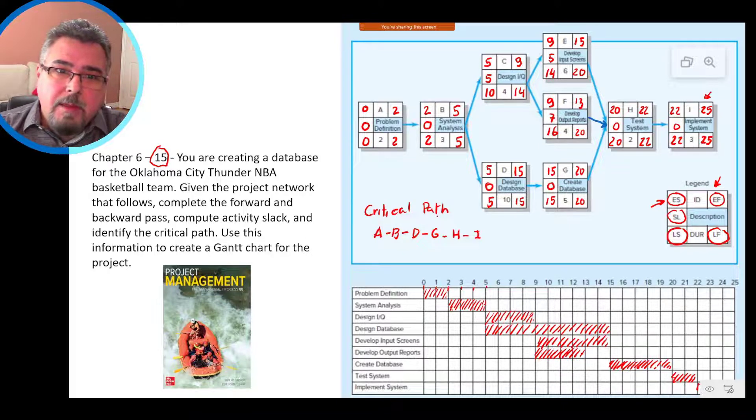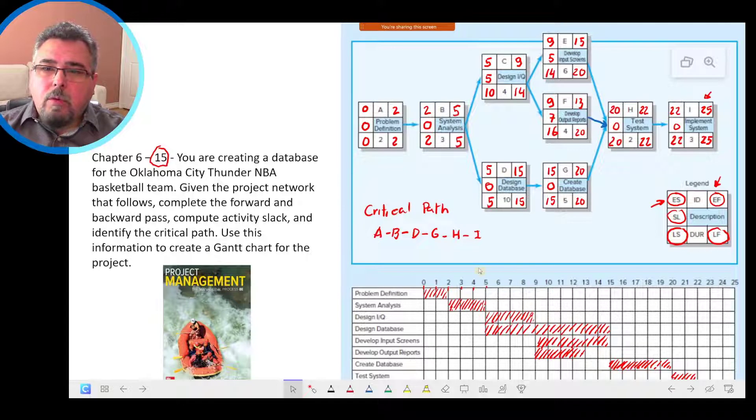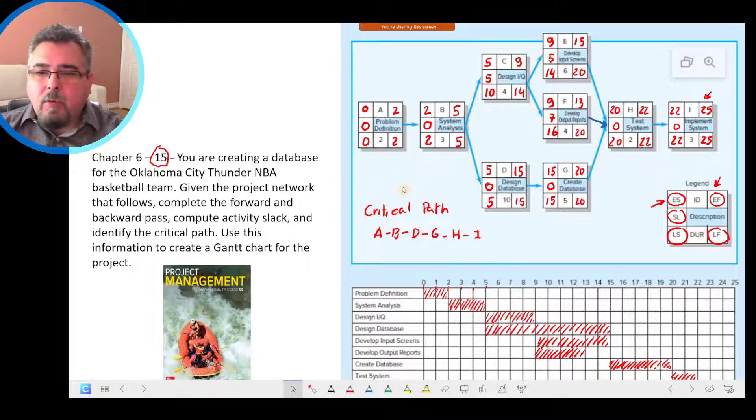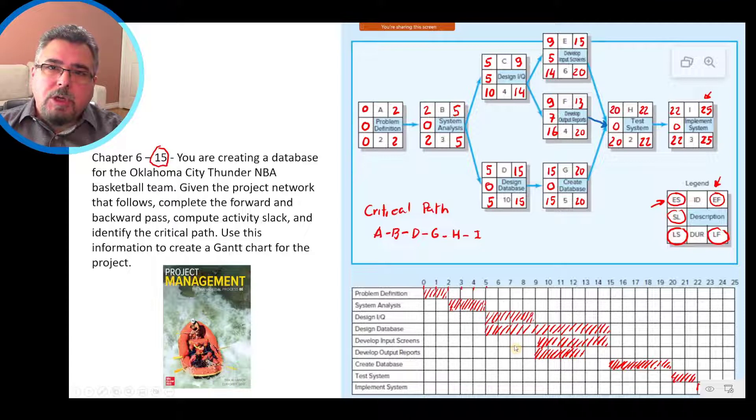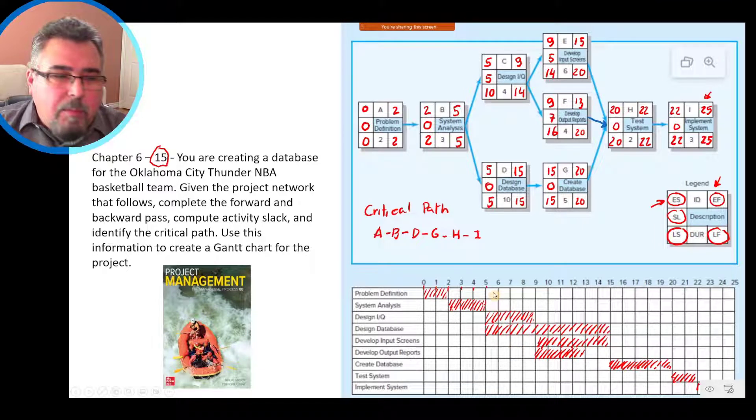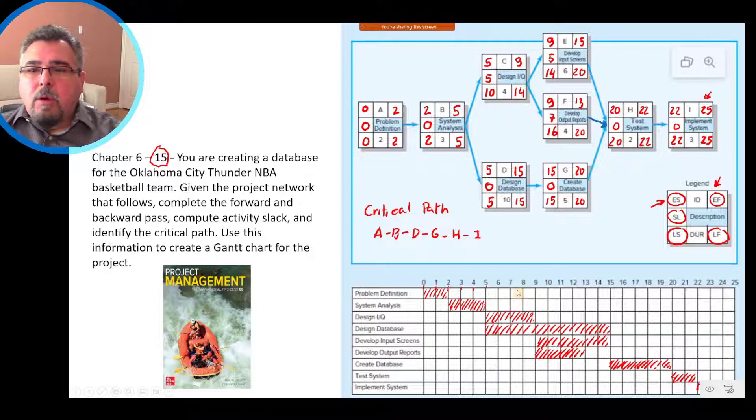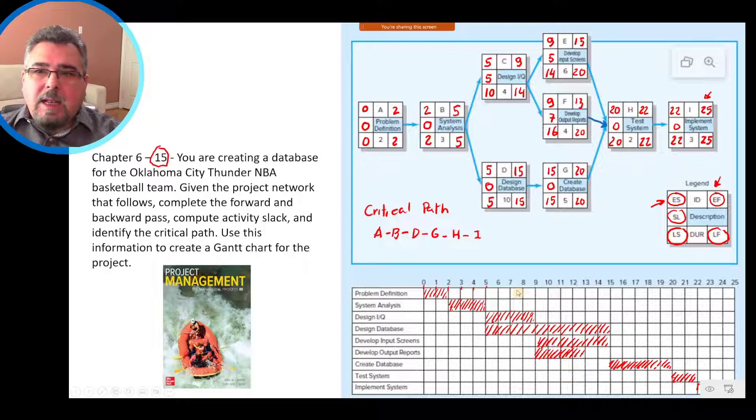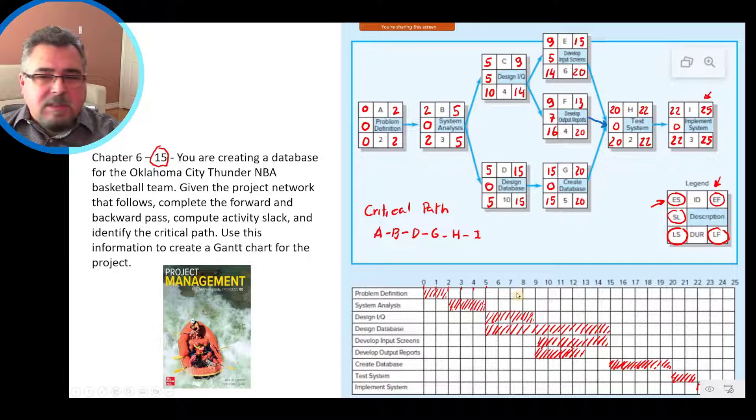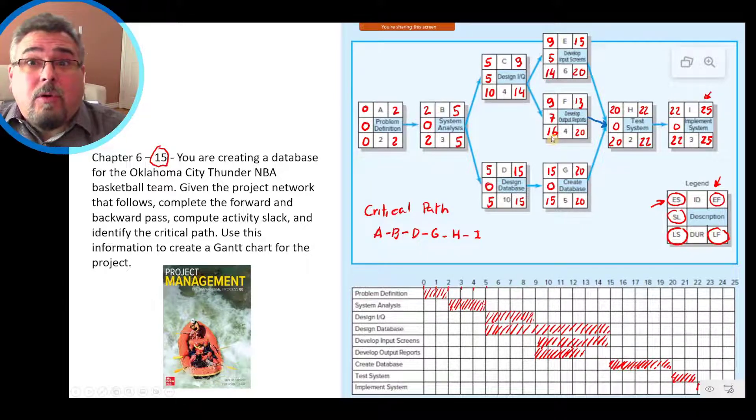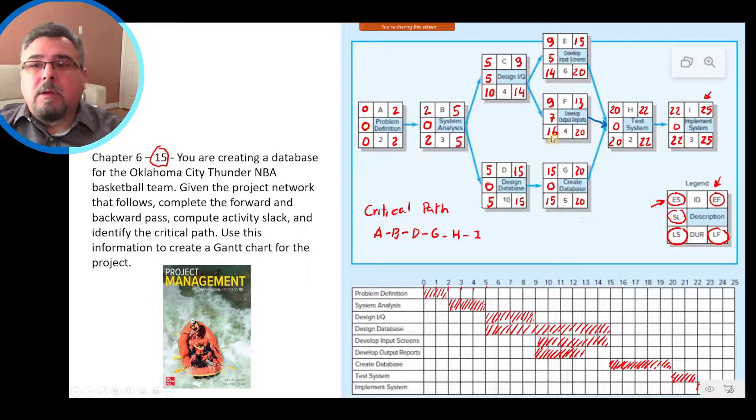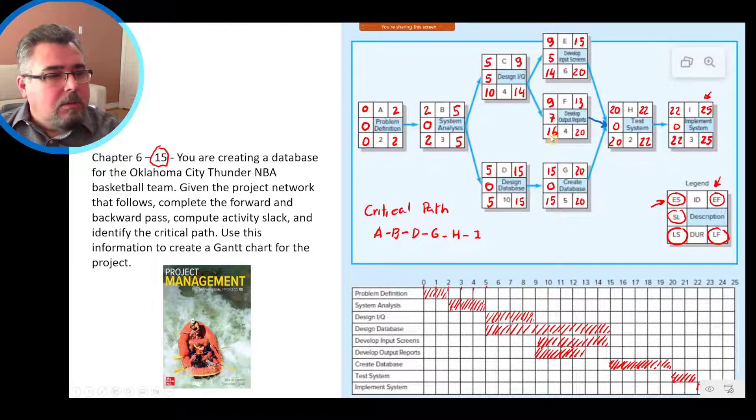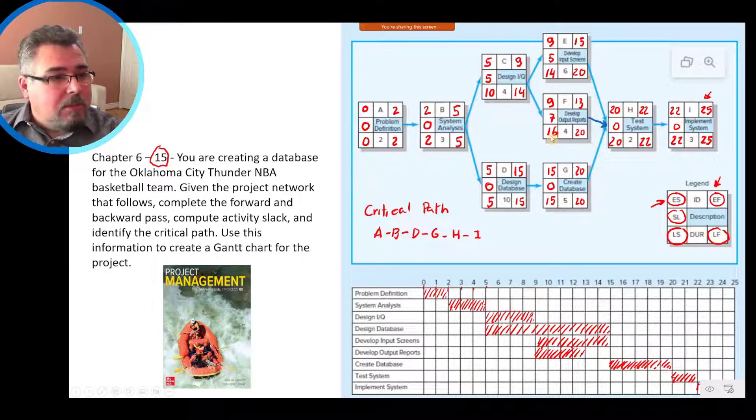So we did the forward path and the backward path. Some type of solution I can ask you during the exam. I can ask you, tell me, see if you are ready for the exam. What is the late start for activity F? 16. Choose the alternative that shows the late start for activity 16. That can be. Or what is the project duration? How many days is the project duration? Or choose the alternative that shows the project duration.